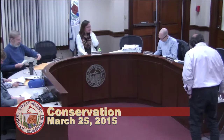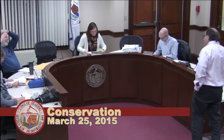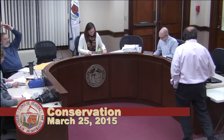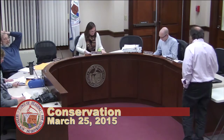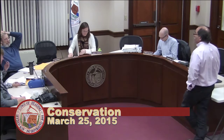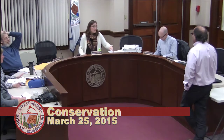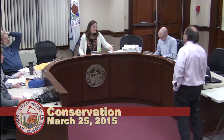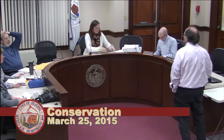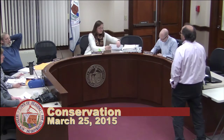George St. Boris, town engineer, Sturgis Park. Before we had the onset of snows, when we went back out there to look at a bunch of things, we actually did notice that there was something else that, since we're doing all this work down there, we need to rectify. It's the wing wall of the entrance by South Street. The whole main easterly side is going to have to be replaced. You can't just fix the last 10 feet, you're going to have to go right to the thing.